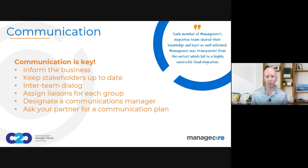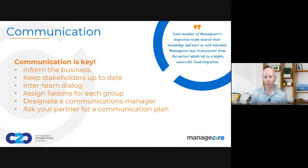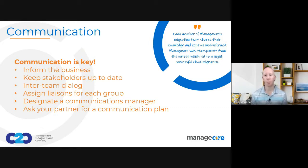Something very beneficial, especially with large teams, is to have liaisons for each group involved in the project. That way you can minimize the number of people in project meetings, and those liaisons can report back to their groups on what's happening. For larger projects, you want to designate a communication manager — sometimes that's the project manager, sometimes it's a whole separate role. When you look at all the people that need to be informed on a migration project, communications can become a full-time job.